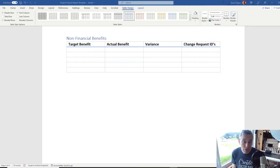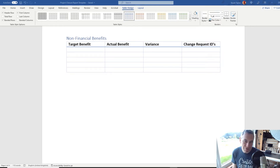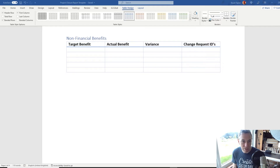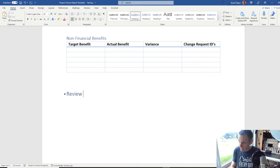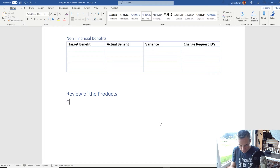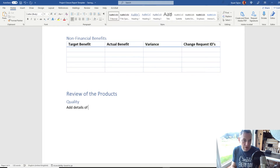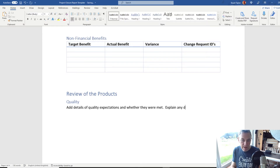There is an argument that quality and risk should appear here as well. Quality gets covered a little bit later on, and risk — people only really seem to care about that at this stage if there are open risks or risks being transferred to the organisation, which will be addressed later. Now we're going to click into the page, add Heading 1, and call this 'Review of the Products'. Go to Heading 2 to create a subheading and put 'Quality'. In this section, you can add details of quality expectations and whether they were met, and explain any deviations.